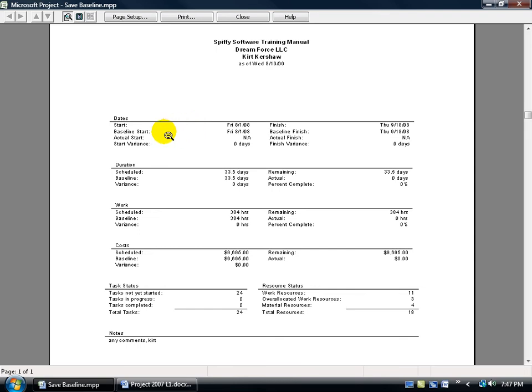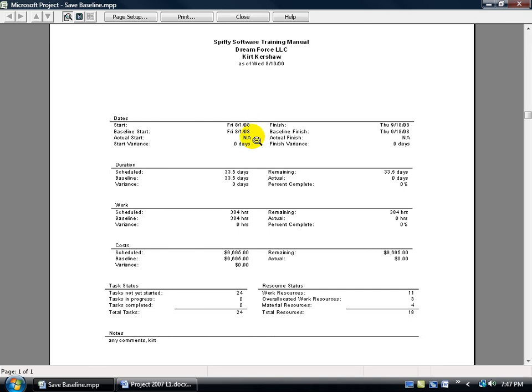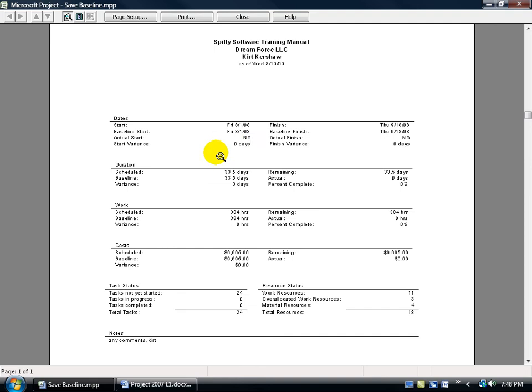You've got your start date, then you have your baseline start, and then you have your actual start. So you said that your project, when you entered in all the resources and your project summary task and all that, is going to start on August the 1st. You took a snapshot of that before you begin the project, which says, OK, your start date I've captured that here, it's now frozen in time, August the 1st, and then you have your actual start date. So as the days start moving along, if you begin August the 2nd or 3rd, you will have your actual start date here. So you have a comparison here. Your start date, your baseline, and then your actual.